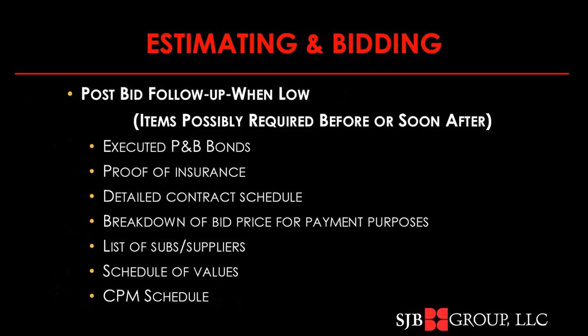In our post-bid follow-up, there's a number of items that may be required shortly after. As I mentioned, performance and payment bonds executed by a proper surety. Proof of the various insurance types. You may need to submit a detailed contract schedule.